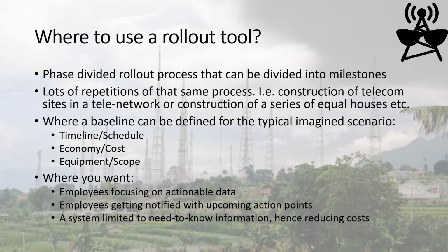Where can you use a rollout tool? Well, you can use it wherever you have a process that can be phase divided and can be divided into milestones. You can use it where you have a lot of repetitions of that same process, for instance, in the construction of telecom sites in a telecom network, or construction of a series of equal houses, standard houses, etc. You can use it where you have a baseline that can be defined for the typical imagined scenario.